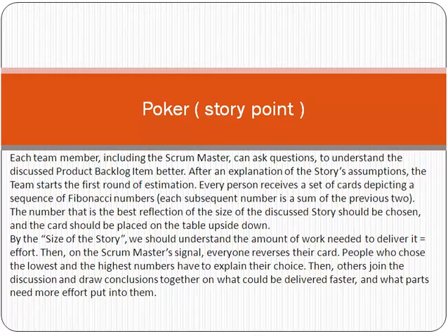We write down the user stories on cards, and we ask the scrum team to give points to each story based on their complexity level. And we use the Fibonacci numbers